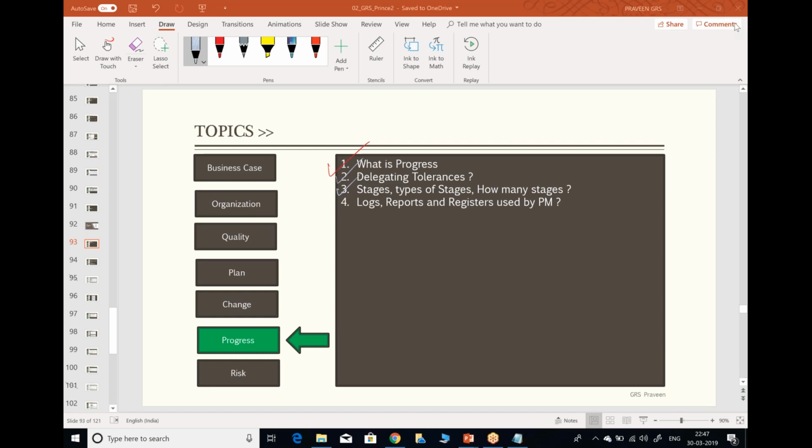For example, I'll tell you, in my organization we have sprints. If certain thing need to be delivered quickly, our sprint is typically 1 week, right? So we have 1 week sprints where we typically start a sprint on Tuesday and end by next Monday. Why Tuesday is because we'll have a better control. It's not Monday to Friday. So if it is non-critical, we have sprints which typically span to 2 weeks. I'm talking about my business unit. So what I should say is, sprints or control points totally depends on organization and criticality of project. Okay, thank you.